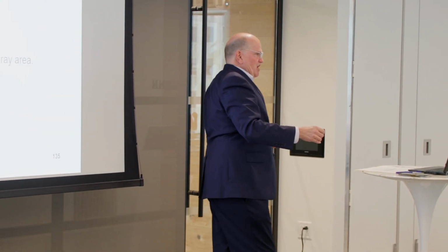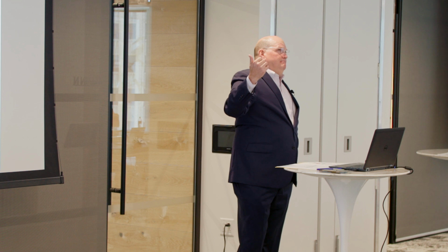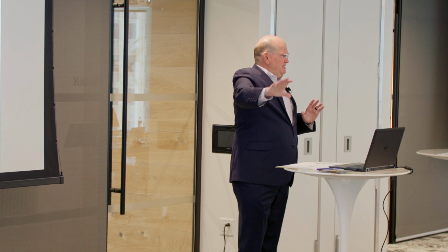Ultimately, the owner pays for defective design in design bid build. It may or may not be able to recover from their designer on the basis of professional negligence, but it's not clear, and it's not an automatic recovery. Far from it. I had a case many years ago at this point, and this is my point about people not just losing track of this on the project site, but in big disputes. Our client got terminated on a